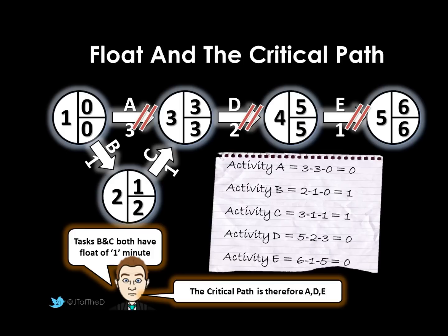How do you show that a task is critical? Well, very simply, you'll see here I've put a couple of red crosses through the tasks that are actually critical. So it shows us these ones that can't be delayed. In an exam, if there were likely to be any changes to those activities, the whole project would fall behind. If there were changes to task B or C, as long as there was sufficient float, I would obviously recalculate my early start time, latest finish times, then actually I wouldn't have a problem.